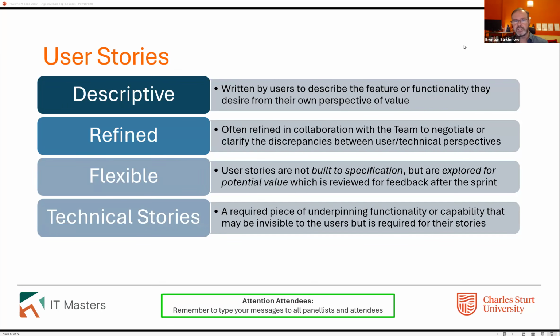They're not going to get their head around that. We have to create that as a team, saying in order for this to happen, we're going to do these underpinning things, and they're called technical stories. And they still get paid for. They still exist in the product backlog. And it's part of the product owner's job to say to the customer, here's all the underpinning stuff. Don't forget, you've got to pay for all that as well. This is work we're going to have to do.